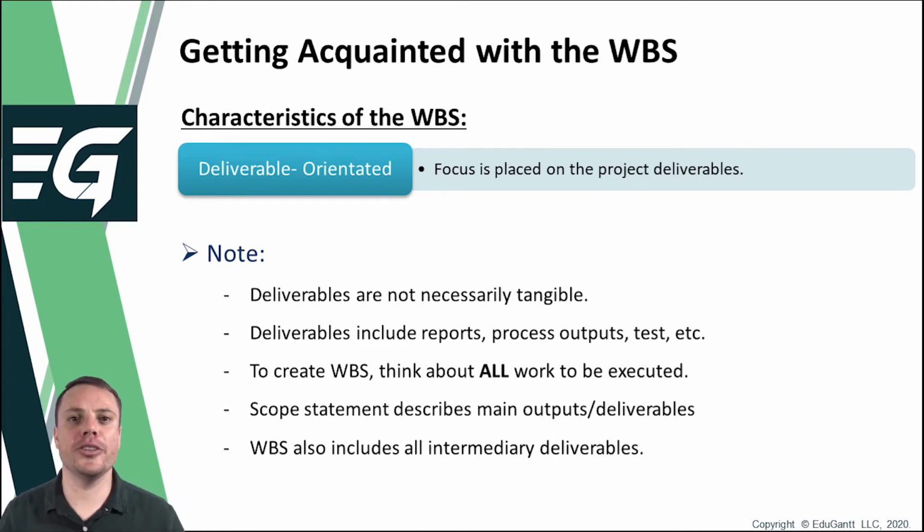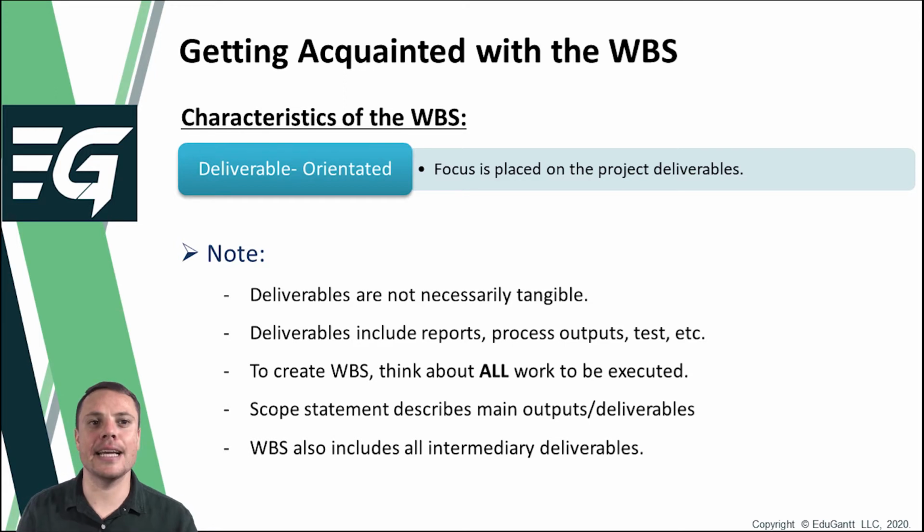First, let's zoom into the deliverable-oriented nature of the work breakdown structure. As the statement suggests, the tendency in project management practice is to focus on the project deliverables when creating the work breakdown structure. It is important to remember here that not all deliverables are physical, tangible products. Deliverables can therefore include reports, process outputs, tests, and the like. When developing the project WBS, it's important to think about all the work that has to be executed in order to create each of the project deliverables.